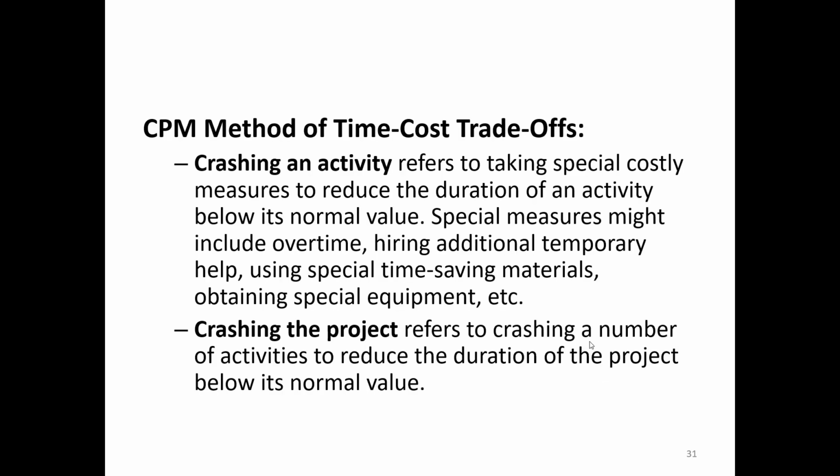Now, a couple more terms, and we have two of them, and they're related to crashing. We can crash an activity, we can crash a project. And crashing an activity is exactly that. We're employing more resources, whether those resources are labor or equipment, in order to reduce the time that a given activity takes. And that could entail adding equipment, renting extra equipment, hiring extra labor, more overtime, or running the equipment a little bit longer than we typically would. We do that with the idea of reducing the time that a given activity takes.